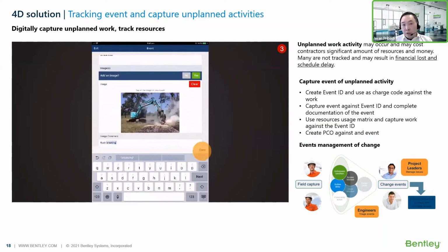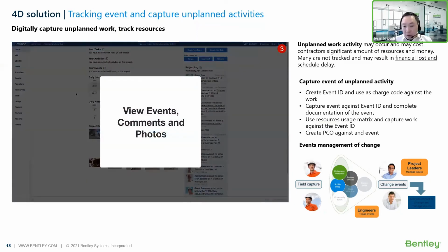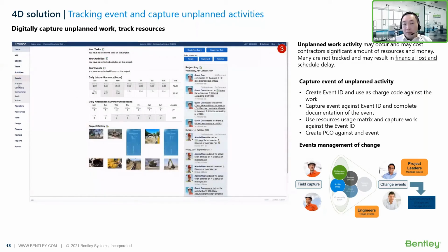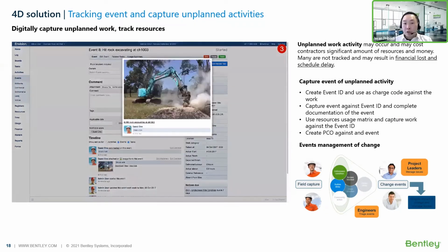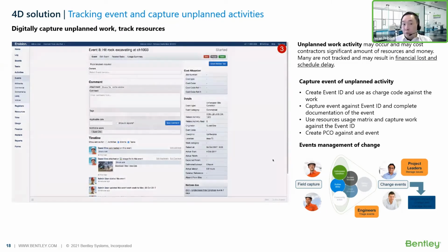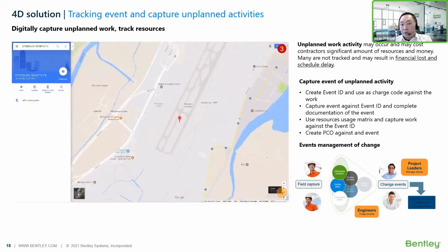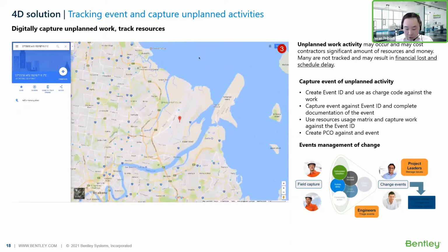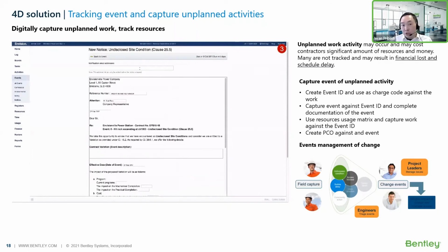Digital technology allows you to take pictures, record the event, and then track the event costs using the timesheet or resource management tool to lock in the costs associated with an event that unfortunately has to happen, right? All of that will increase the project cost that you have to be able to recapture at the end of the project. So we have the tool that is appropriate for this, to make it easier for contractors and projects to collect costs and share with the rest of the team.